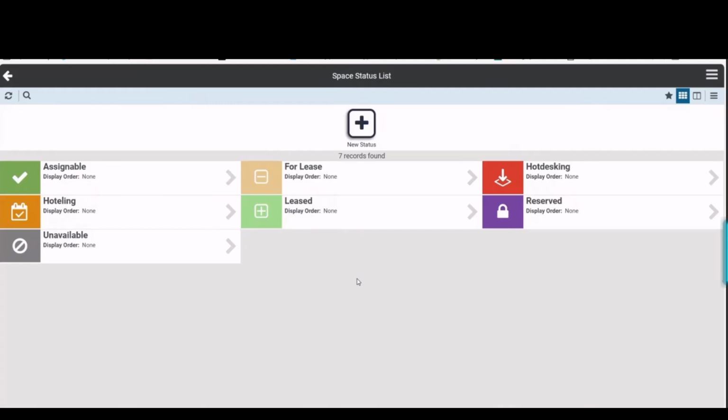Sometimes the fire code vendor would take the drawings from the architect and use those as the official room number. And so they don't match reality. They don't match the signs. They don't match the space management floor plans. And a fireman can literally not be able to find a heart attack victim because there's a disconnect there.